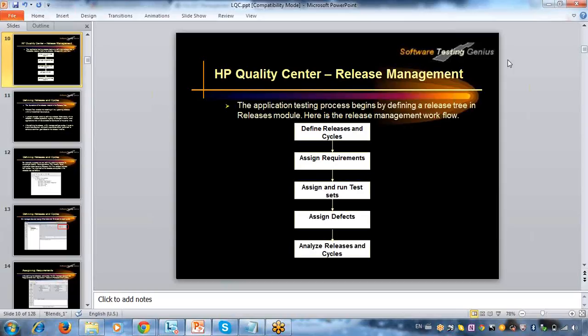Also, the test lead or test manager cannot give his own dates. He has to get in touch with all the team members and get inputs from them, and then he will provide your test cycles, which is nothing but your test plan. In the test plan, you give the timeline. Similarly, instead of having documentation, everything we are tracking in the tool itself.